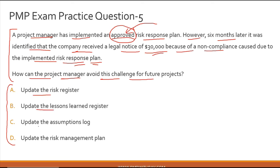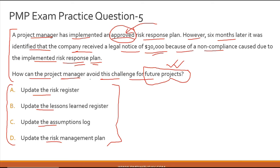Options: A — update the risk register; B — update the lessons learned register; C — update the assumptions log; D — update the risk management plan. To answer this correctly you need to read the question word by word. The answer lies in the phrase 'future projects.' If you are doing something to correct a mistake not for this project but for future projects, you are essentially doing a lessons learned — learning from one mistake and applying it to future projects.